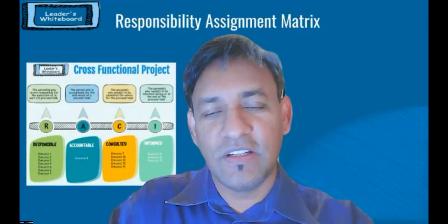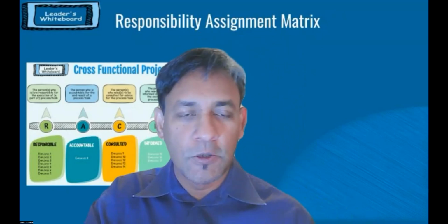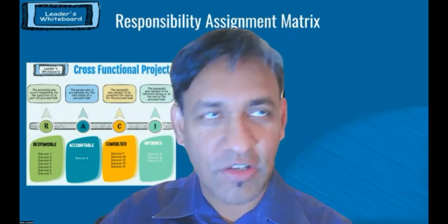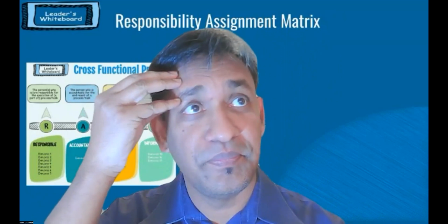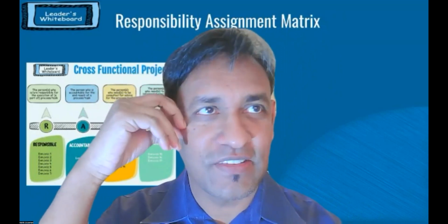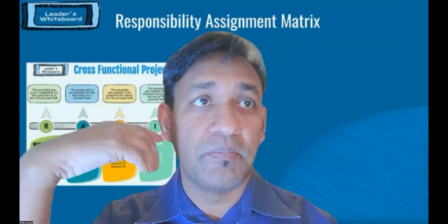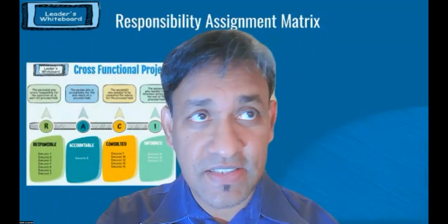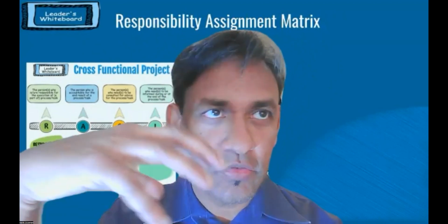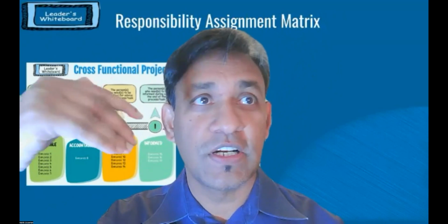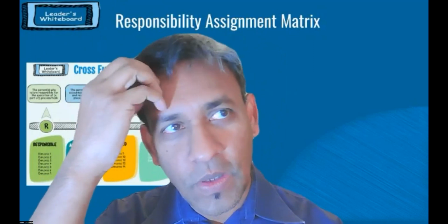After taking this model, different companies or different people make some modifications here and there to build some custom RACI model of their own. For example, you may have heard of RACI-VERIFY, where V stands for verify, or RACI-VS, verifier and signer. Another model is DACI. They are changing responsible, accountable, consulted, and informed into four different ones: driver, approver, contributors, and informed. Very similar to RACI, it's just they are using different wordings.